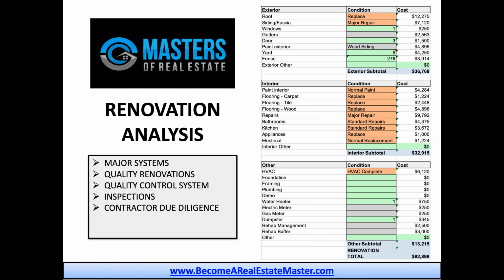And you have to do your due diligence on contractors. We've been stolen from so many times from contractors. Even if we're doing the due diligence, sometimes it's hard. You want to make sure they have the right insurance. You want to make sure that they have a good reputation. Get some referrals of other people they've done work for. Look at those pictures of their previous finished product and what that looks like as well. Go through the ringer with these people. Make sure there's no issues. Do a background check. Make sure you have the right contracts in place with these contractors.